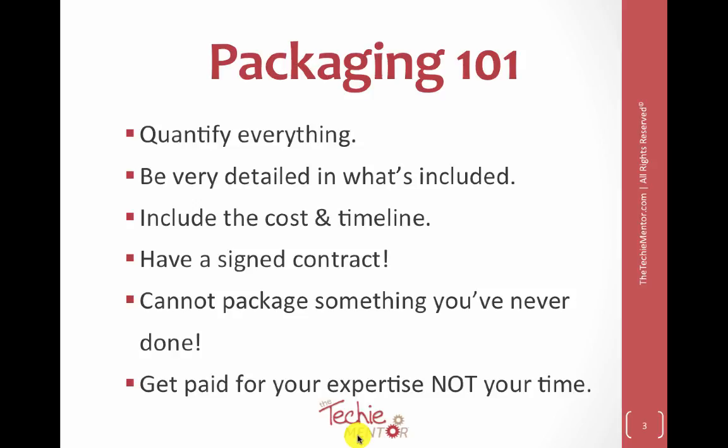It's just as important when you have a retainer or you're invoicing clients: any work that you do, you need to have a contract. You can't package something you've never done before because you don't know how long it's going to take to get the whole thing done. So I really recommend that you time yourself on doing maybe the mock project so you can get a gist of how long it takes you to do things, because we all work at different speeds. And make sure that you're getting paid for your expertise, not your time.